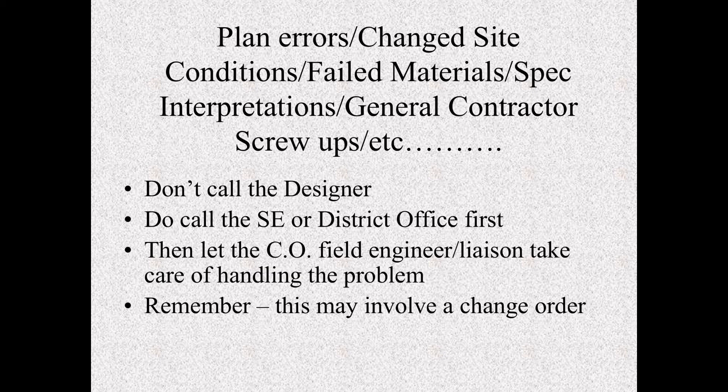If you get plan errors, they're going to happen. Try to resolve it at the lowest level possible. Only the engineer can change the plans — as an inspector, you are not allowed to change any contractual document. Only the engineer can do that and it must be done via a change order. So if you find an error, don't call the designer — call the section office and your engineer first and then try to figure out how you can correct it. That is it for staking and layout. Thank you for your time. I hope this was beneficial.